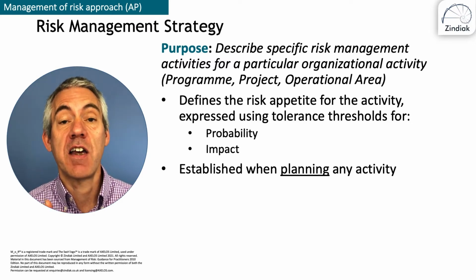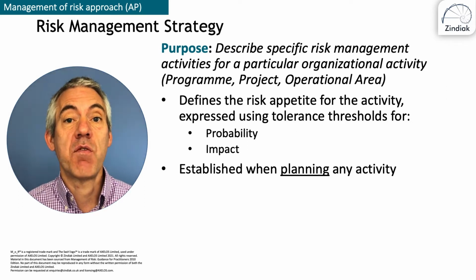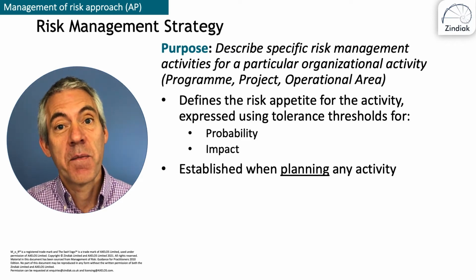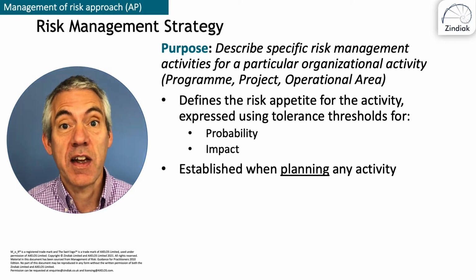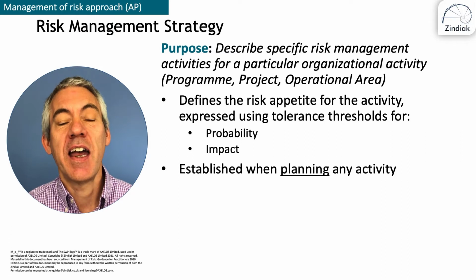And in fact, if you are following PRINCE2 6th edition, the latest edition released in 2017, they actually talk about the risk management approach rather than the risk management strategy. The reason for that is they recognise that very often what we're doing is taking the risk management strategy for all projects within our organisation and tweaking it a bit if necessary.